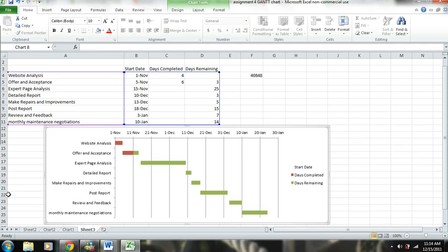And as far as doing a Gantt chart, if you want to just present, maybe before the project has even started, an estimate of how long each task is going to take, you could go and enter it. It's basically the math. Right here, this was obviously a 4-day task. If you add this up, this is a 9-day task. This is a 25-day task. From November 15th, 25 days later would be your end date.